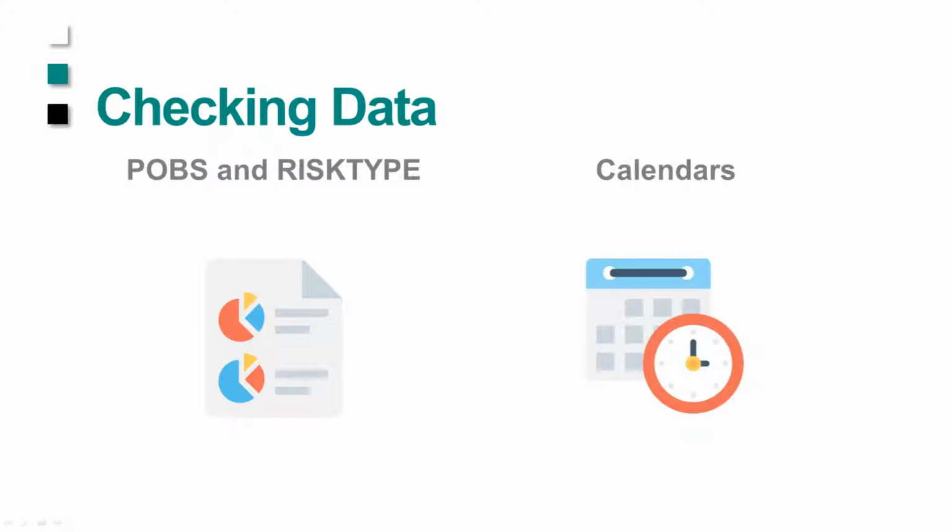We have people who are importing files from outside sources that have huge risk type files containing tens of thousands of values, and they're just not good, of course, to bring into your database. So P6-Scrubber automatically will take those two items out if it finds them in your XER or your XML.